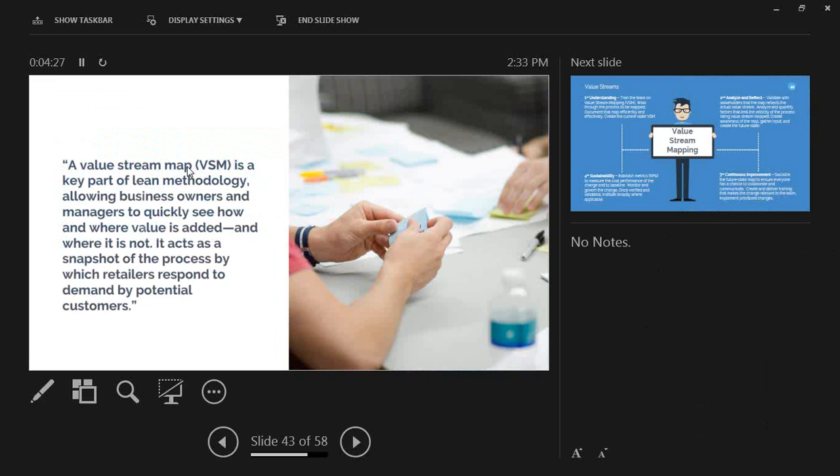So then, value stream mapping. Value stream mapping is really the understanding of the processes within the organization. DevOps is as much about automating processes as it is about the tools used to do this, from configuration management. Agile likewise. Regularly we do a review to see how things went in a sprint. We're tuning if our estimates are off over a number of sprints or cycles in terms of the work we're doing. We're recognizing that and updating our estimates. Are the estimates long-term going to be off by a percentage, or are they just wrong to begin with, and we have to now understand that?